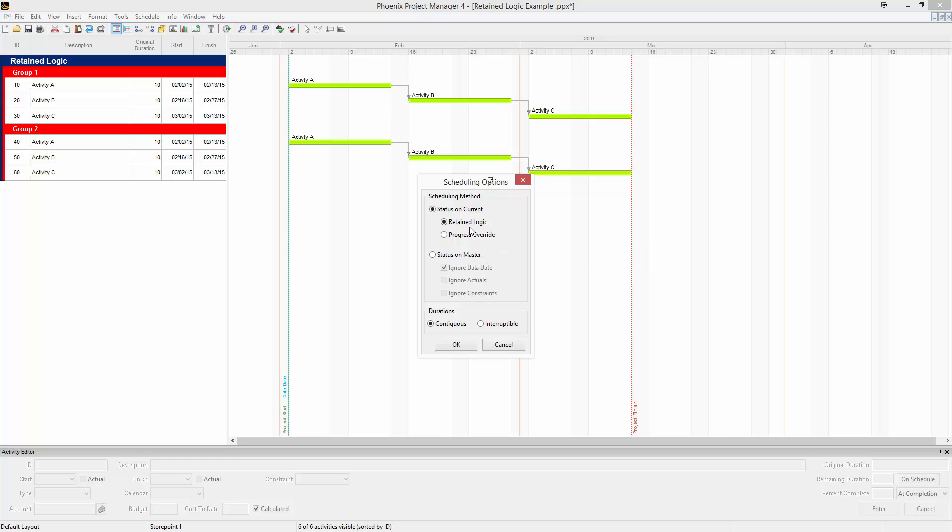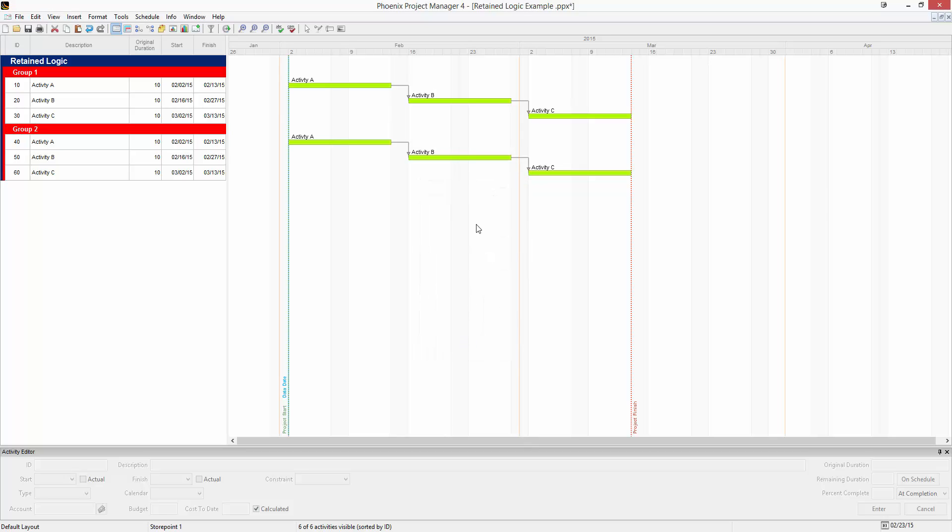We're going to leave it in retained logic right now. You can see the way that this is originally scheduled, we have three activities in two groups: activity A, B, and C. These activities are all ten days and linked finish to start when one finishes the next can begin.